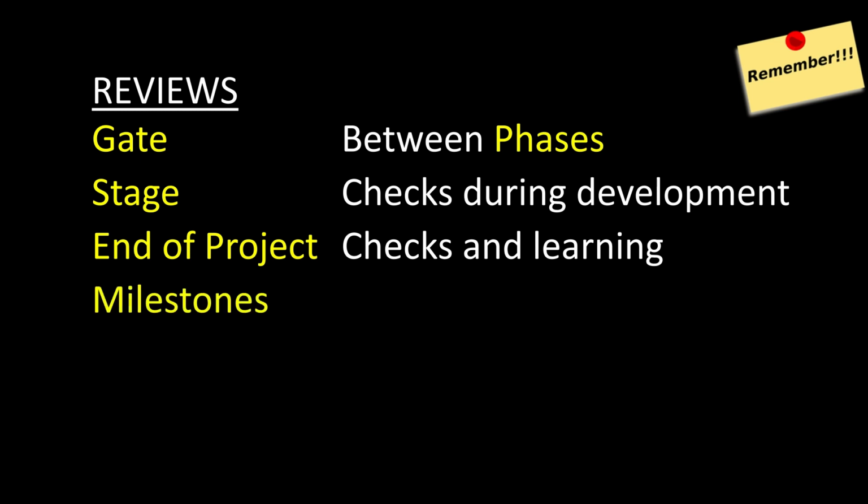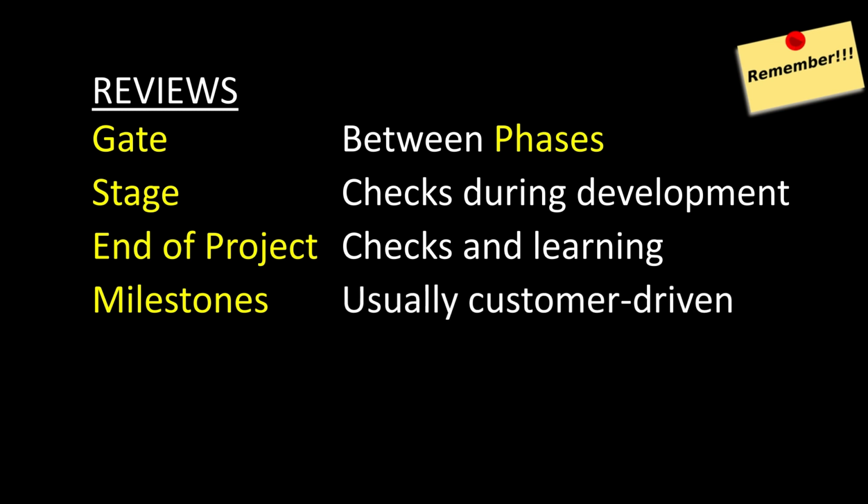You may also have some milestones as part of your project, which are generally, not always, but generally driven by key stakeholders, such as an external client or the customer, where they are asking specifically for updates at a particular time. They're often linked to payments. So if your client is saying, when you have finished this part, we are going to pay you for it once we're happy that that part's been completed. So those milestones often involve a meeting, where you're going to be able to say, this is what we've achieved, and they're going to say, we're happy with that, we'll pay the bill, or we're not happy with that, we're not going to pay the bill yet.